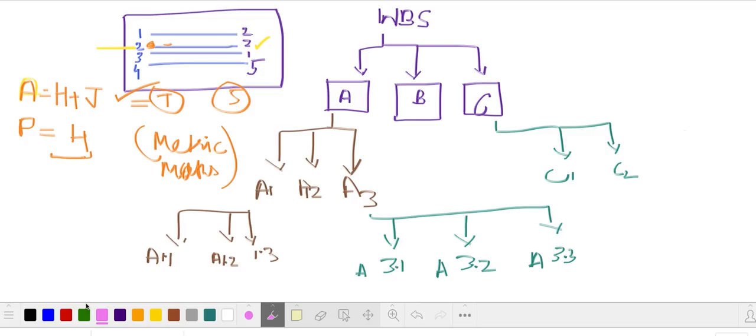So he has to go back and look for the historical information, but now with the metric, like per wall, how many boxes of paint would be there, and how much per dollar is the amount of that particular box. So I'm talking about numbers, right?